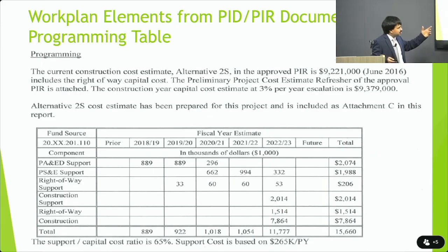But as a PM, you would be held responsible to some extent to ensure the accuracy of the support component budget estimates. So how do you develop them? Typically, you solicit information from the functional units. They'll give you the hours required for them to complete the scope of the work. You put it together, and then you develop the budgets for these 4 support components.